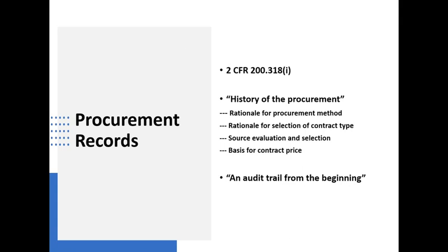When you're doing cost analysis of a contract proposal, one of the things you're going to be asking the contractor, if they haven't provided it as part of their offer, is where did you get your numbers? What's the cost reality here? Okay, so those are things that would need to be expected as well.